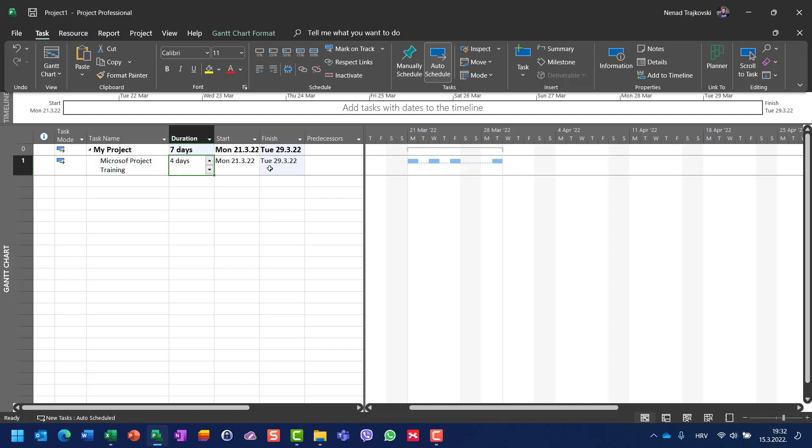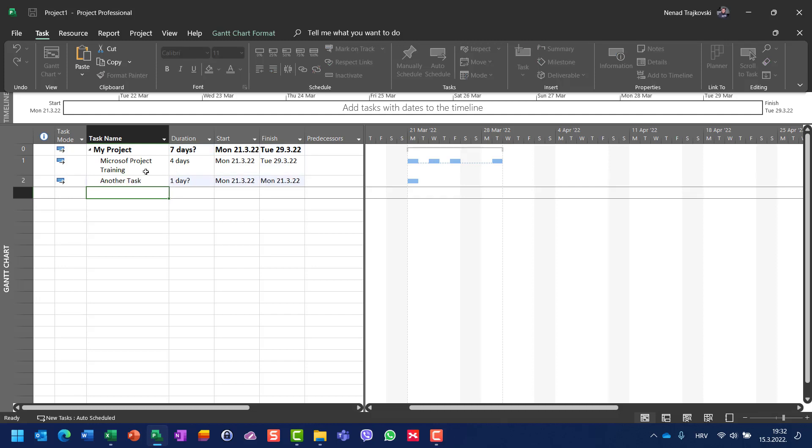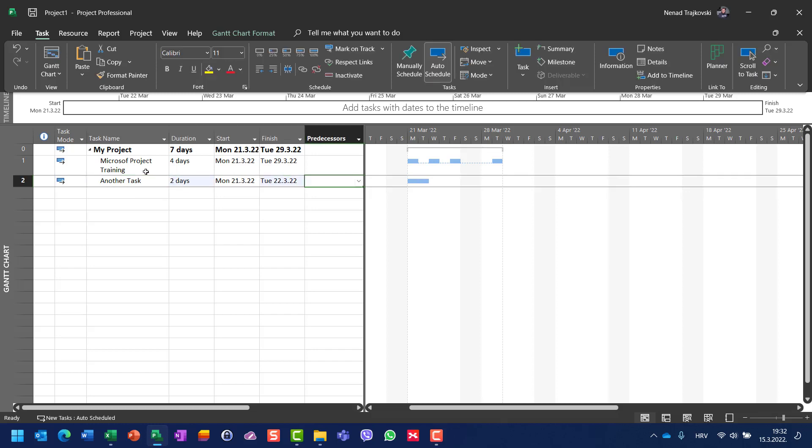Be aware of one thing. If I want to have another task, let's say two days, and if I want to make a predecessor of task number one but after the first day, I cannot do it.